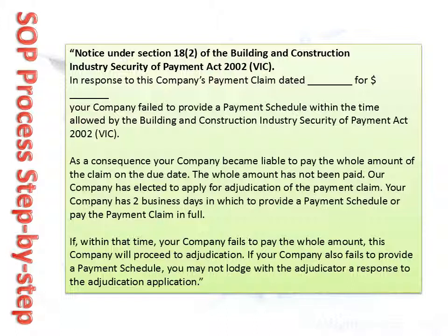The contractor also has the option of doing nothing, but rely upon the fact that the debt is due and payable under the Act, and that they could go to court, with the client being unable to defend the action, as a negotiating strategy to get payment from the client. The third option is to go to adjudication.